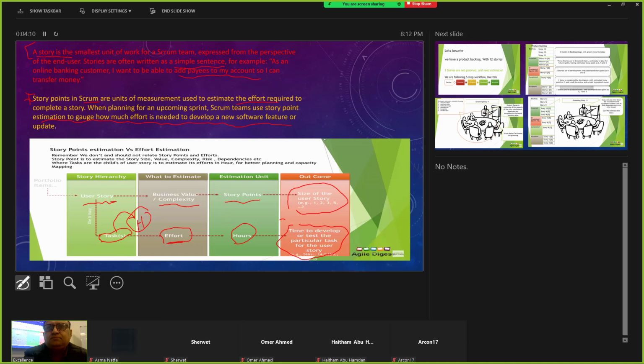programming, scripting for having the render reel, having the purchase inside the game available for people to use, how long it will take me, how many hours. You will not be estimating that. At that level, you are estimating what? You are estimating this user story that I have told you as a client, and you will say that the business value and the complexity of that might be, for example, let's say 40 or 400 story points.